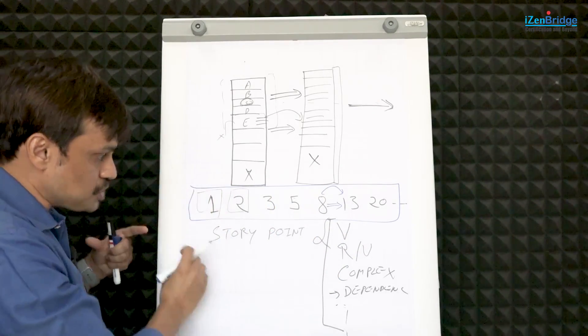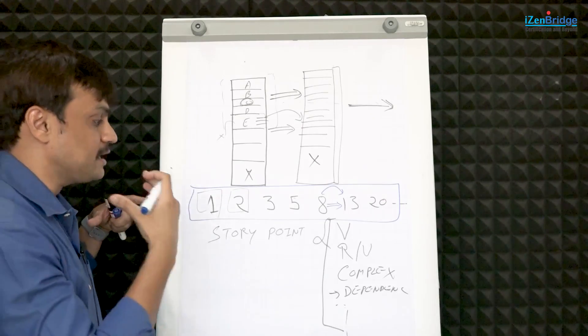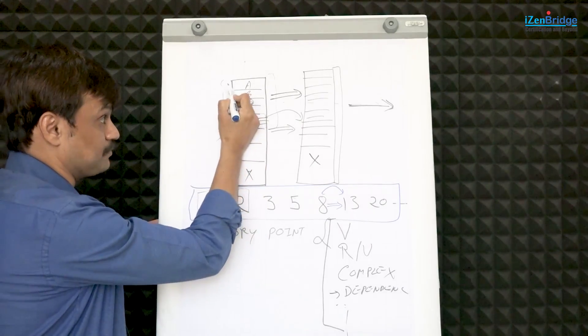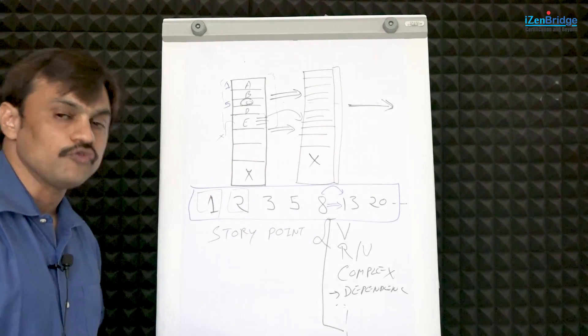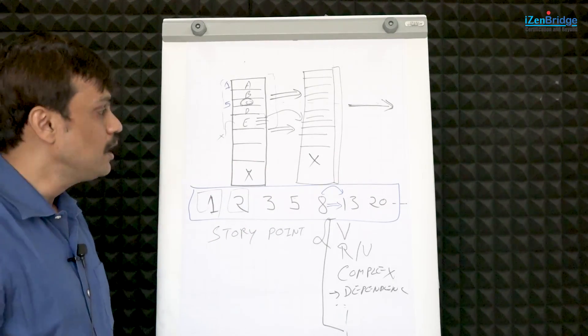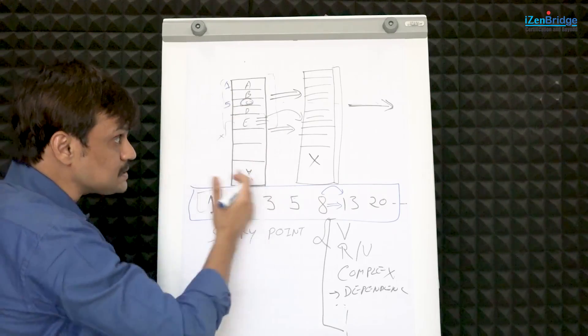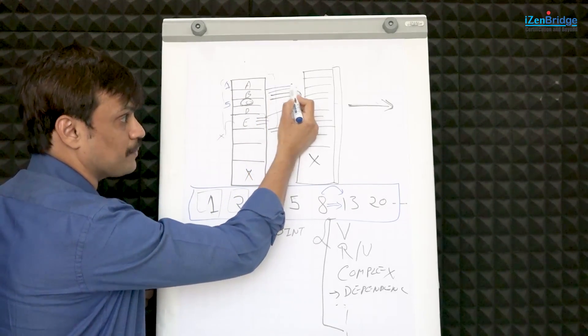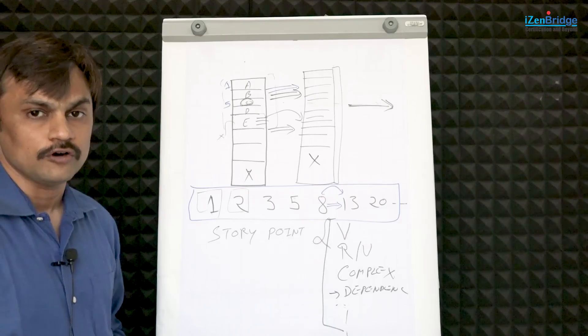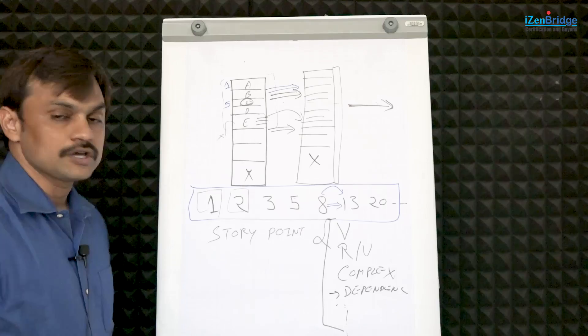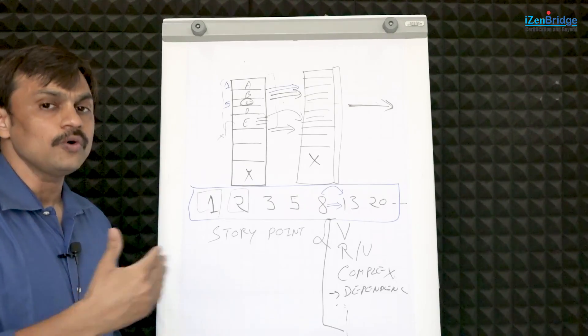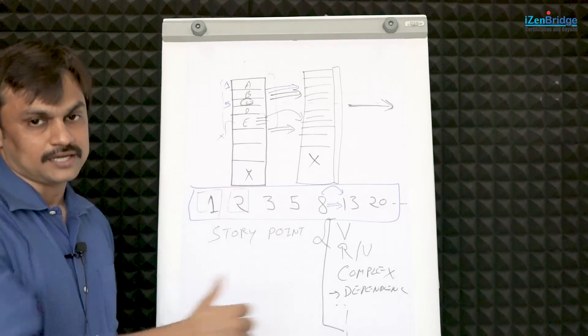The judgment is made by the team, and when they are making the judgment about categorizing something 1 or something 5, they are considering various factors like volume of work, complexity, risk involved. And this understanding and judgment may evolve over a period of time, and we should not be shy of modifying our estimates based on the new learning, because the product backlog is expected to emerge as we go in our project progressively.